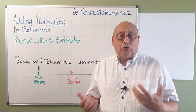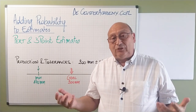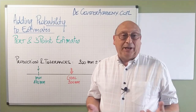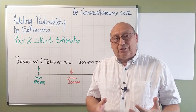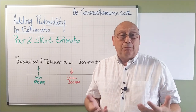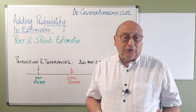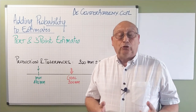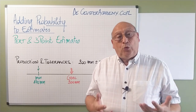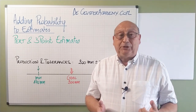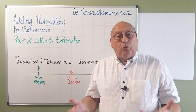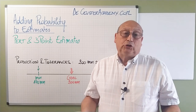On the other hand, when you're looking at your travel time to work, you may see when you start taking a sampling that there are some things — there is a value, a duration, which is appearing the most. We call that the mode. And the mode is the most probable duration. Basically, when we are going to introduce uncertainty or statistical elements in project management, we are going to look at what is the most optimistic time, what is the most probable time or the mode, and what is the most pessimistic time.